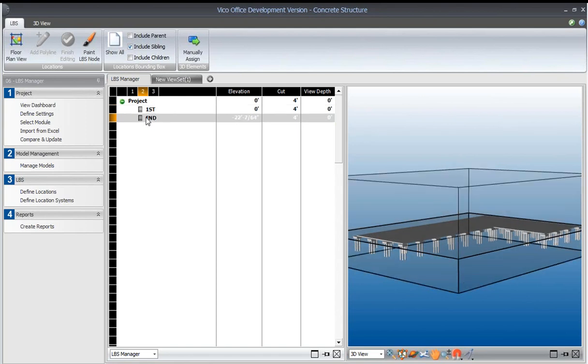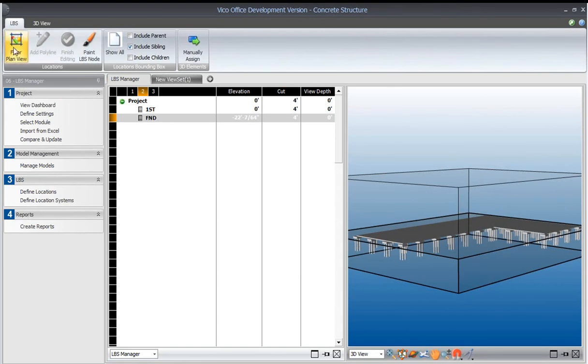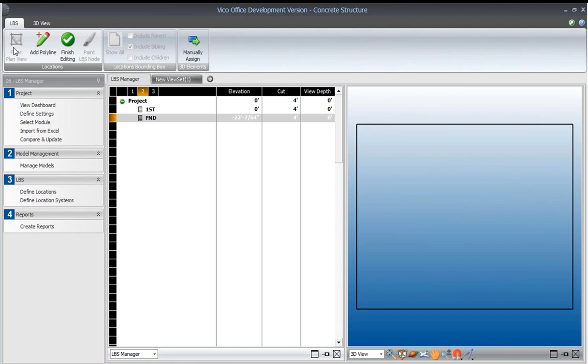I mentioned that we were going to divide the foundation into different zones and we would like to quantify all of those concrete elements by those zones. So the first thing that we would do is select the foundation and view it in the floor plan.